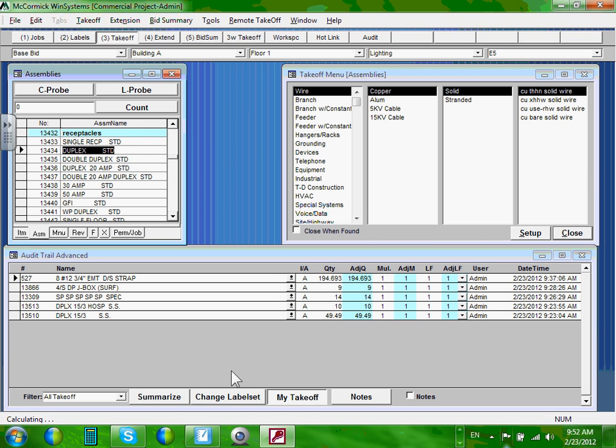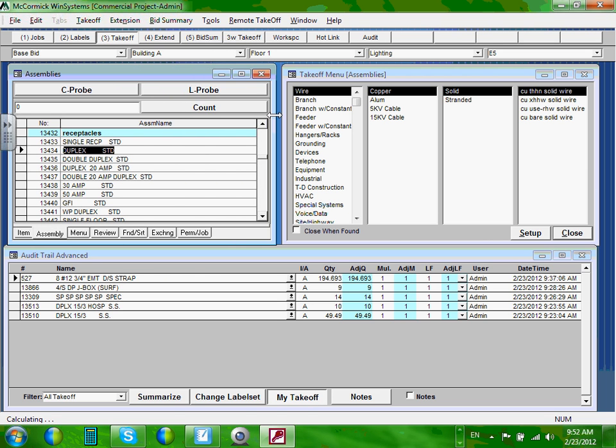Okay. Let's go talk about lights. When you do lights, there are 2 components for lights. All the fixtures, guys, are going to be coated material. The fixtures themselves are going to be coated, meaning we will have a coat added to the project. That's 99.9% of the time how we do it. So we're going to take them labor only. We're going to take these babies labor only. Okay, for lighting, let's talk about lights first.